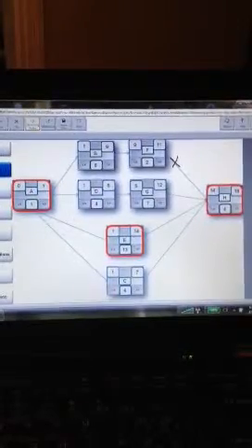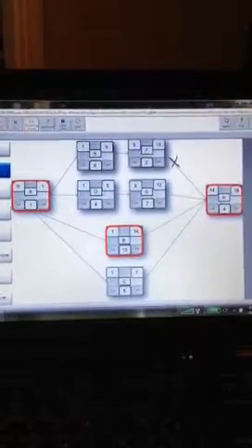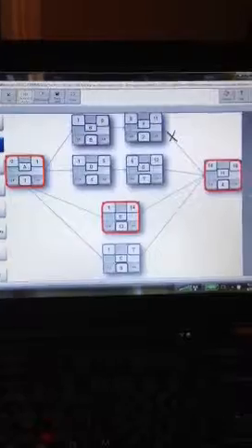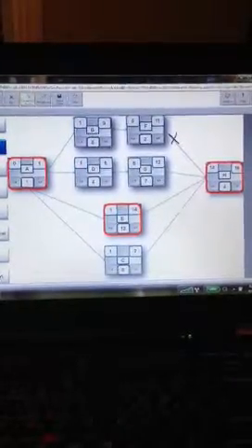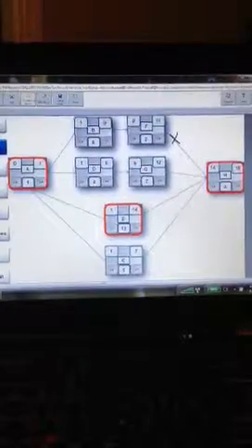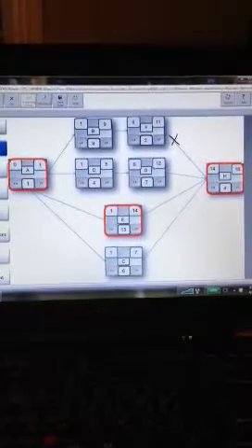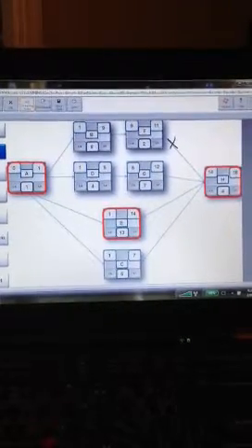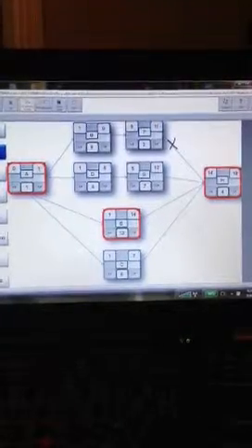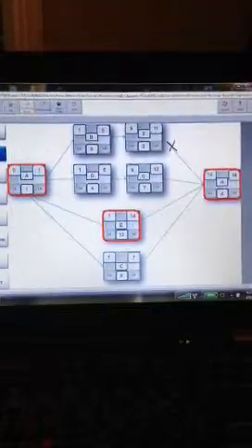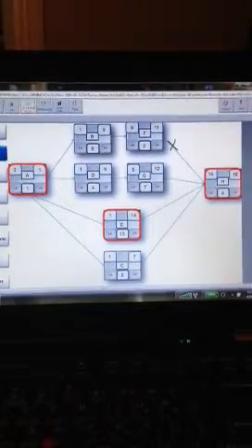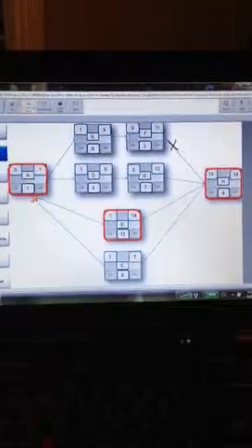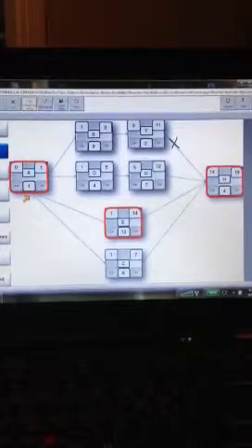There you go. And Judy, I like what you put. She said, I don't know if there's a critical path yet. Exactly, because H is attached to every other activity, and we haven't done the math yet on the other paths. They all use H. So whenever you see convergence into one ending activity, you're going to want to make sure that you stop and do the math on the other ones to evaluate the other paths. Exactly. You're absolutely right. It's not the critical path, but we may not know that yet until we do all the rest of the addition.